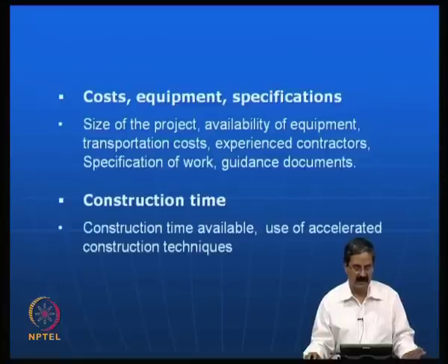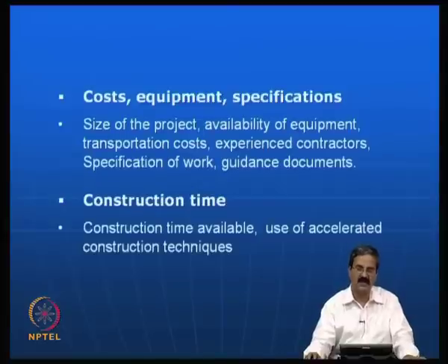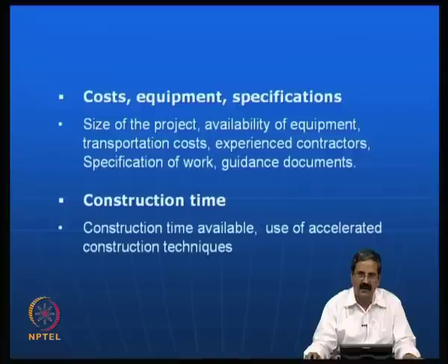So, people should have the specifications properly written, all the consultants, all the engineers should understand the specifications. In some cases, many of the ground improvement techniques are well developed in some countries, but in some other countries if you want to use them, they are not available, because in that country the specifications may not be accepted. So, that is a big problem. For example, in Indian conditions, we do not have too many specifications for ground improvement techniques, we just have one for stone columns and geosynthetics a bit, but it is not complete. So, this is a big problem when the contractor wants to use some of these techniques.